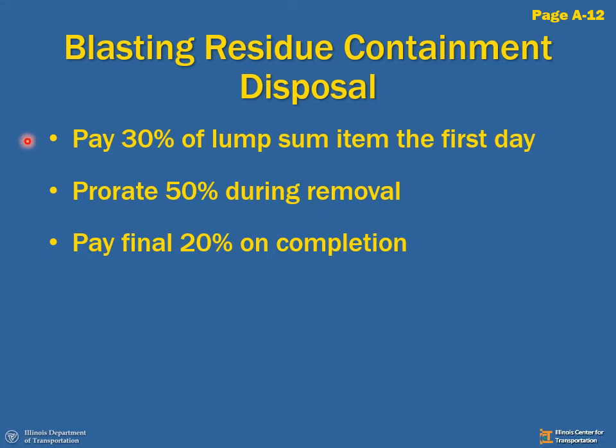This is typically a lump sum item, so just like the traffic control, we're going to pay 30% of the lump sum the first day that they mobilize and get started. I'm going to prorate 50% of the lump sum during the removal work. I'm going to pay the final 20% when they are complete and they've removed all the equipment and materials from the job site and I have all my paperwork. I said this was a hazardous material. They have to take it to a licensed landfill, and therefore we want to get all of our waste manifests in order and our environmental compliance is all in order.